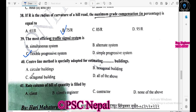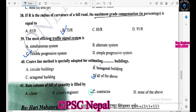The center line method is specially adapted for estimating circular buildings and octagonal buildings. The right column of the bill of quantity is filled in by the contractor.